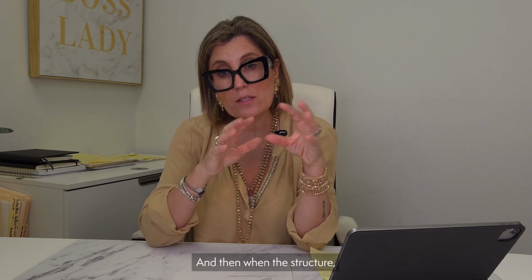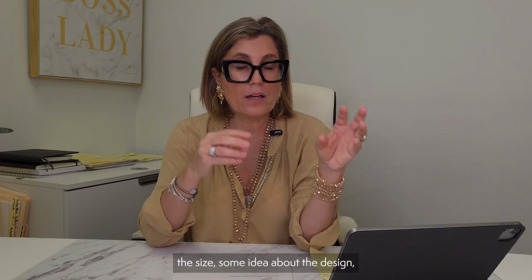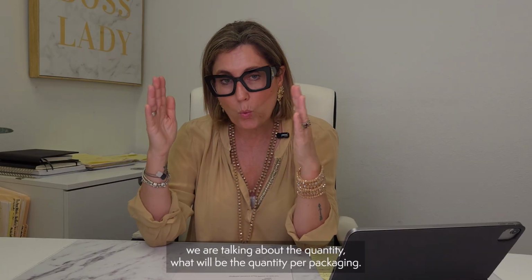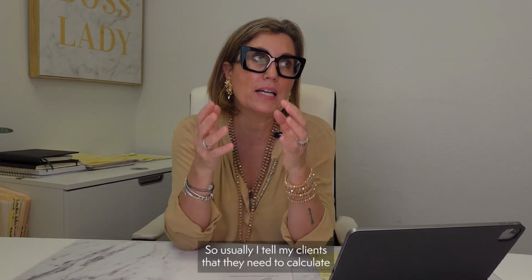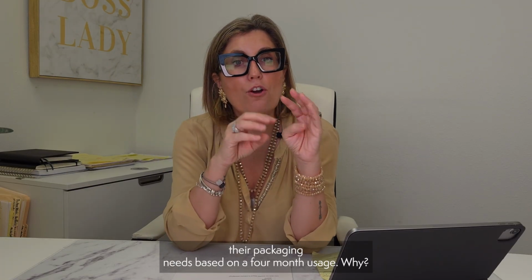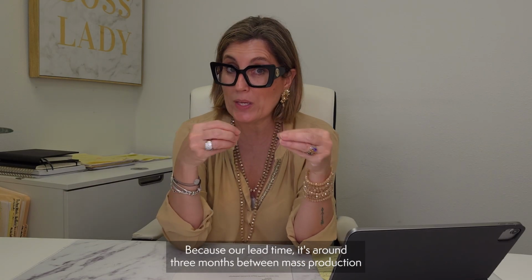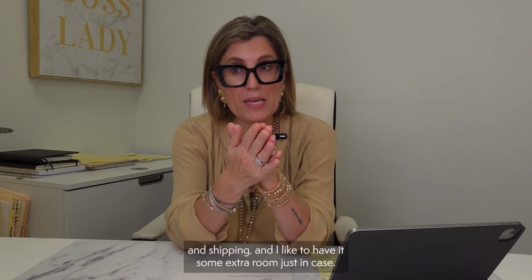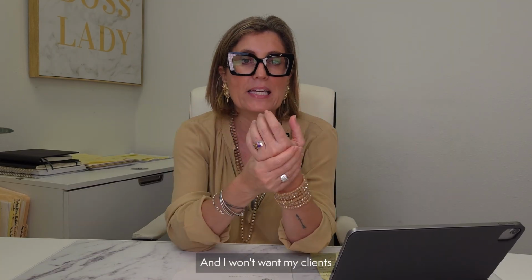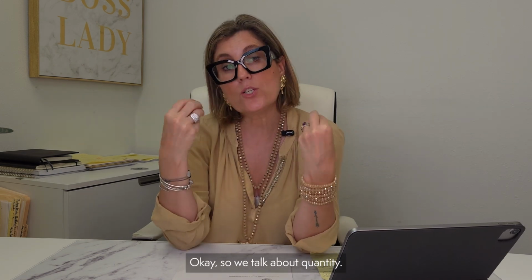And then, when we have the structure, the size, and some idea about the design, we are talking about the quantity. What will be the quantity per packaging? So usually I tell my clients that they need to calculate their packaging needs based on a 4-month usage. Why? Because our lead time is around 3 months between mass production and shipping, and I like to have some extra room just in case. You never know, and I don't want my clients to be out of stock or low in stock with their packaging, okay? So we talk about quantity.